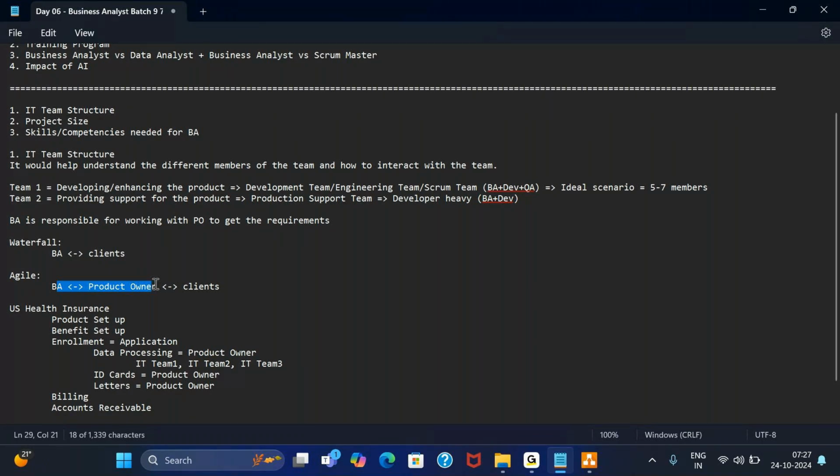Mostly, if as a business analyst you have any questions or doubts related to requirements, your first point of contact will be the product owner only. If the product owner doesn't have answers to your question, either the product owner will ask the client and get you the answer, or the product owner can tell you, hey, why don't you directly reach out to the client and start talking to them. That's up to the product owner, but the regular protocol is we will not bypass the product owner and directly go to the client. There is no direct working unless the product owner has given their approval.